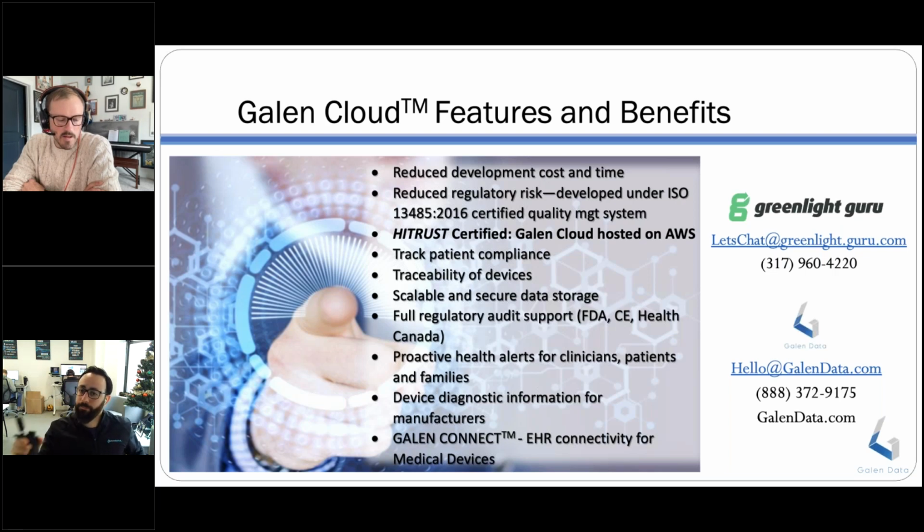Yeah, enrollment might be, just off the top of my head, the biggest one. Slow enrollment, just gaps in enrollment. You're paying to have the study running. I think if there's a lot of study amendments, that can also slow things down a bit. So getting it right the first time, if at all possible, with minor changes down the road is a lot better than trying to get up and running as fast as possible, maybe with a half-baked protocol or CRFs. So amendments can change that a lot.